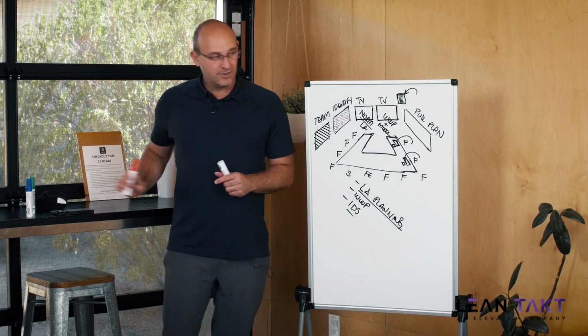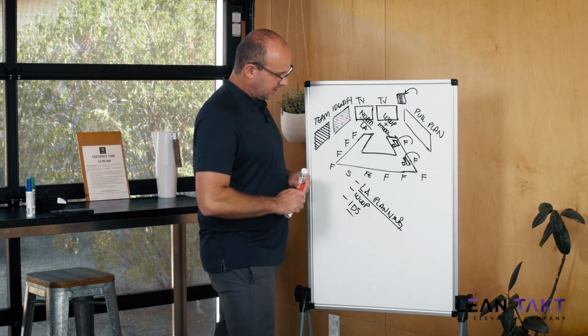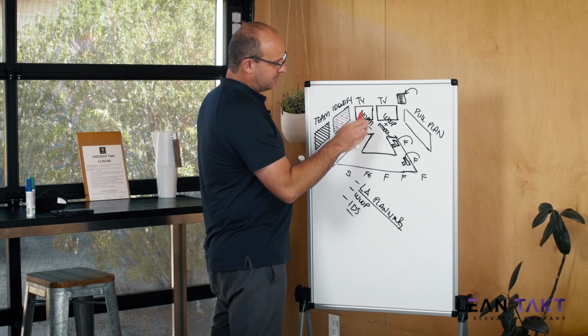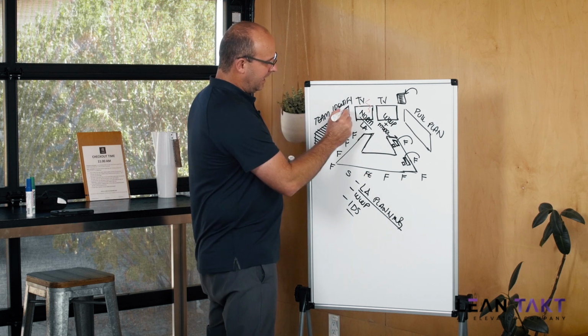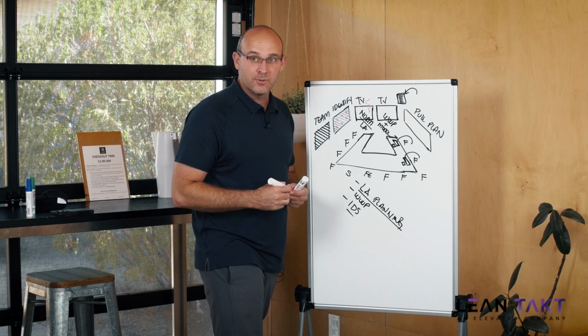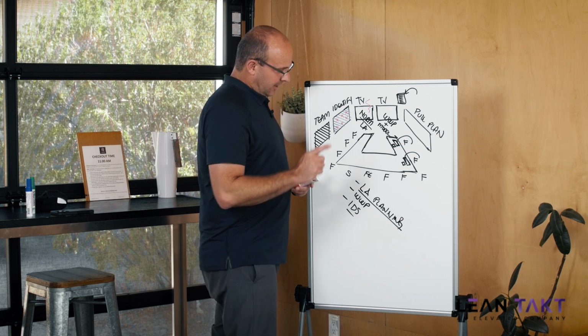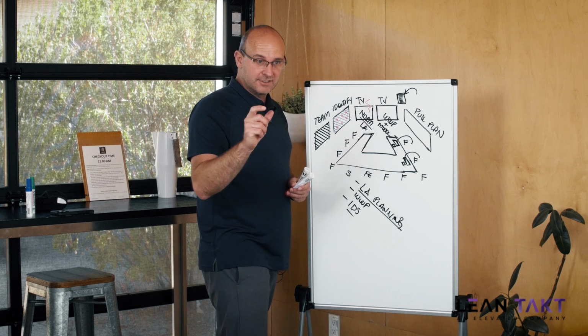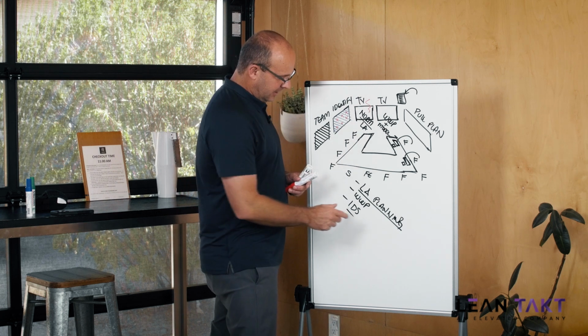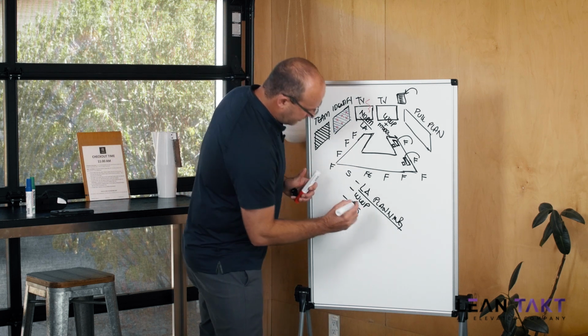And then you guessed it, when you're doing the look ahead planning, you can make adjustments here. So I'm going to do a squiggly line that says adjustments here and continue to write the problems on the board. This is genius. Okay. Then once you feel like you have a good look ahead plan and any collaborative adjustments have been made, you go right into your weekly work planning.